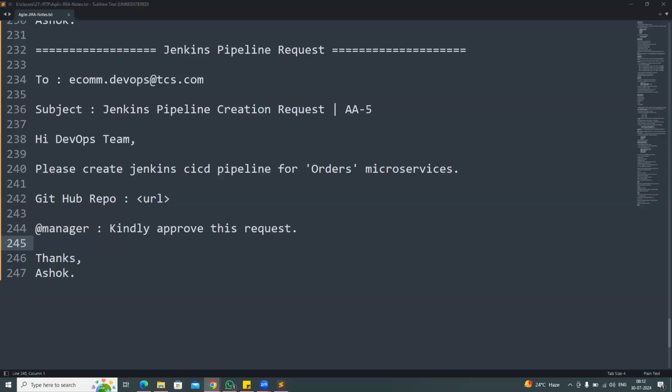So you have to complete 30 points, right, for this sprint? Do you get assigned 30 points of stories at a time, or first you take only one story, then you need to complete it? Once it is completed, then you need to take the next story. So for every Scrum call, you're responsible for answering about, say, a 3-point story, right? Correct. For example, if you're taking 8-point stories, you give the progress like, yes, I'm working on it, and I'll be completing by tomorrow or the day after. You can tell that.